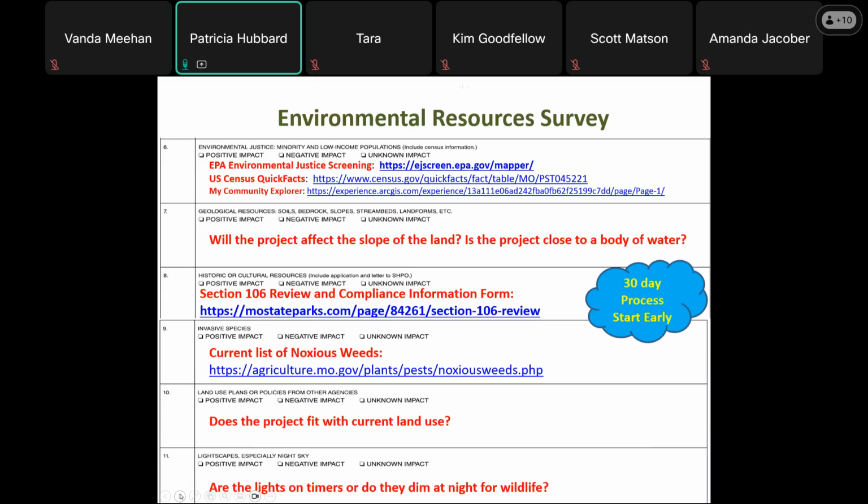If the information that you provide to SHPO is significant to make a determination, the SHPO will send you a letter with their determination. Include a copy of the SHPO letter along with the entire 106 review packet that you submitted to SHPO as part of your supporting documentation. If the information you submitted is not significant to make a determination, SHPO will send you a letter requesting additional information or may require that a professional archaeologist or architectural historian conduct a cultural or architectural survey.